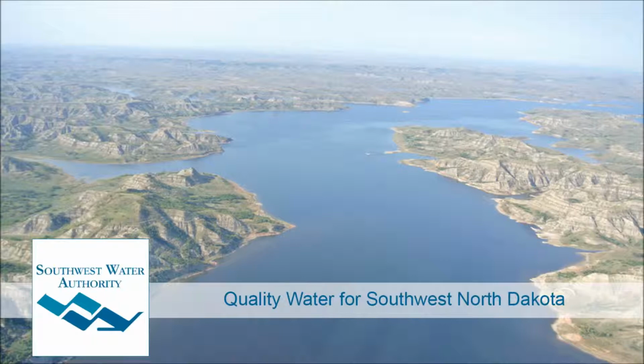Well, that's exciting news. And we assume that the rural construction is continuing as well for the authority? Yes, for the Southwest Pipeline Project, Eastern Oliver County is moving forward. The contractor is installing pipeline. And for Western Oliver County, we did have the pre-construction meeting, and they have been flagging and do expect to start on that project probably this week with construction. With installation of pipeline, they will work on the 6-inch line this year. There won't be services installed this fall, but we're hopeful they'll get a good start before freeze up.